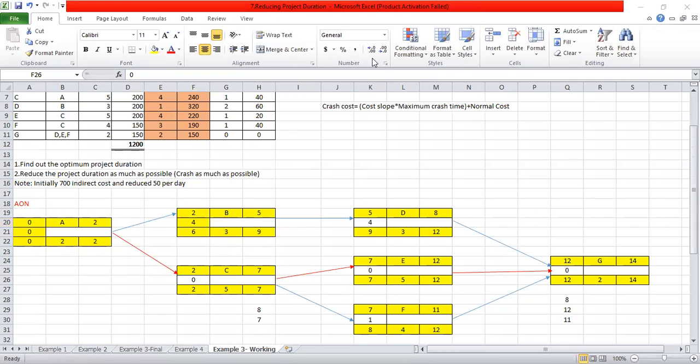Right, very good. You have drawn the tree path as well. So 0 here, and 9 minus 5 means 4 slack for the D. Again for the E, 0 slack. For the F activity, 1 slack. And for the G activity, 0 slack, right?